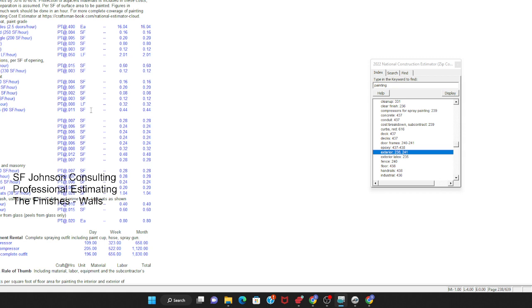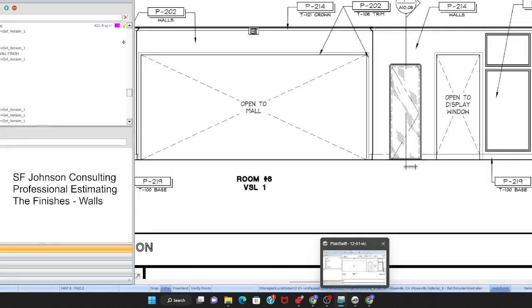So yeah, that's more than linear, but look at the linear. The linear paint totals are always the most labor intensive because you have to be very accurate. You got to line it up. Keep that in mind. And so if you got a lot of linears on your estimate, you're going to make some good money, but be ready to have a lot of tape.